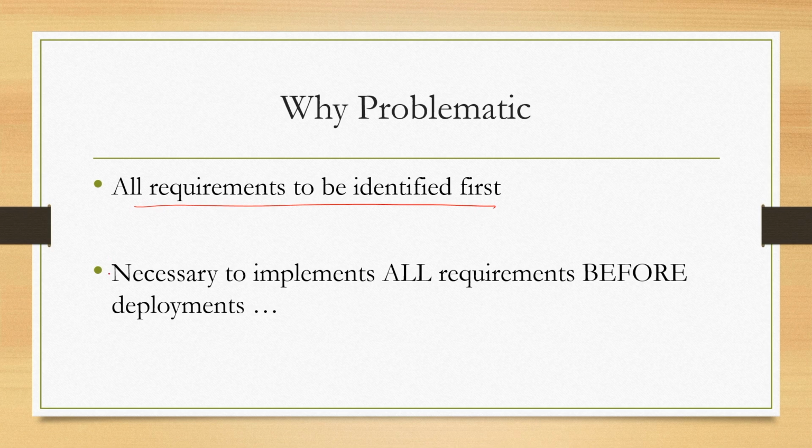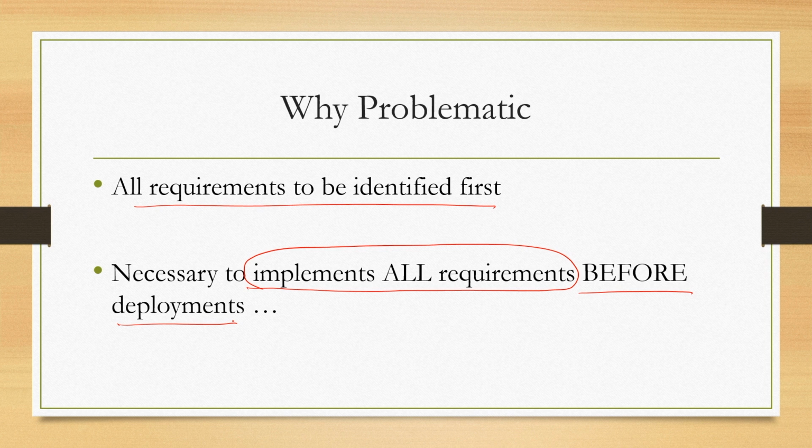So, what the traditional way of doing things says is that we need to execute all activities and requirements at a stage before we can go to the next stage and before deployment. When we talk of the deployment stage, that means everything is perfectly done: all requirements identified, coding done, code tested, usability tested, then only we go for deployment. Now, since each stage can take a long time, the eventual deployment may take very long.